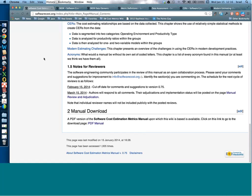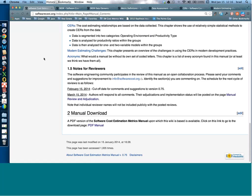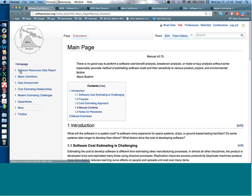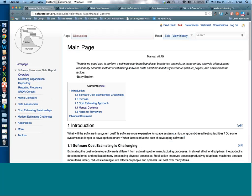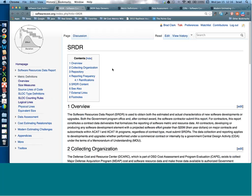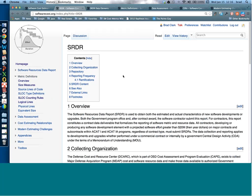Now I want to talk about the Software Resources Data Report — this is Chapter 2. If you click on the Overview link, you get to the next page. The Software Resources Data Report is a Department of Defense requirement for large contracts to report information about software development.